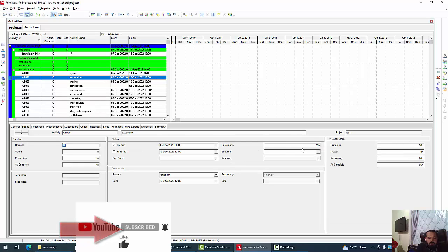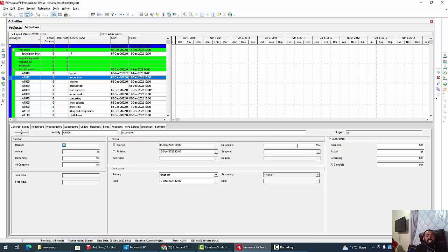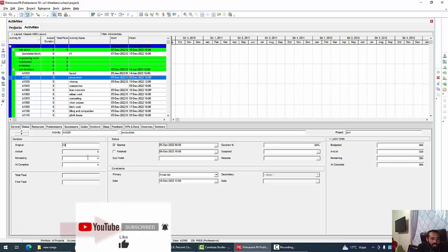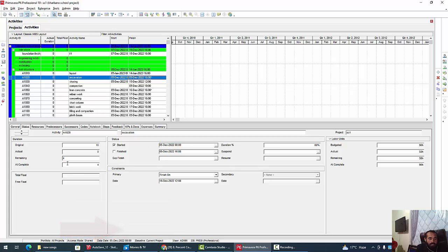Let's come to status. For example, I completed my work, completed or done 6 days of excavation, then my work completion is 60%, okay, 60%, because in 10 days I worked 6 days, okay, that's why I completed just 60%. And this is original and remaining, okay, it comes by itself. I did this 60%, it comes by itself for this, okay.